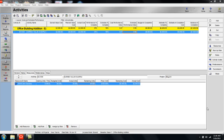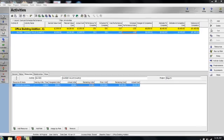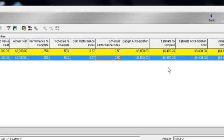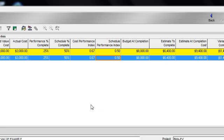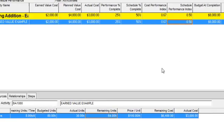Let's take a look at what we have so far. On the activity we've been tracking, we can see that we currently have an estimate to complete of $6,400. $6,400 was calculated based on the remaining cost of my activity.